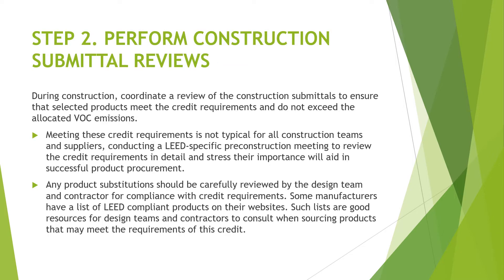Step two is to perform construction submittal reviews. During construction, coordinate a review of the construction submittals to ensure that selected products meet the credit requirements and do not exceed the allocated VOC emissions. Meeting these credit requirements is not typical for all construction teams and suppliers, so conducting a LEED-specific pre-construction meeting to review the credit requirements in detail will aid in successful product procurement. Any product substitutions should be carefully reviewed by the design team and contractor for compliance. Some manufacturers have a list of LEED-compliant products on their website, which are good resources for design teams and contractors.